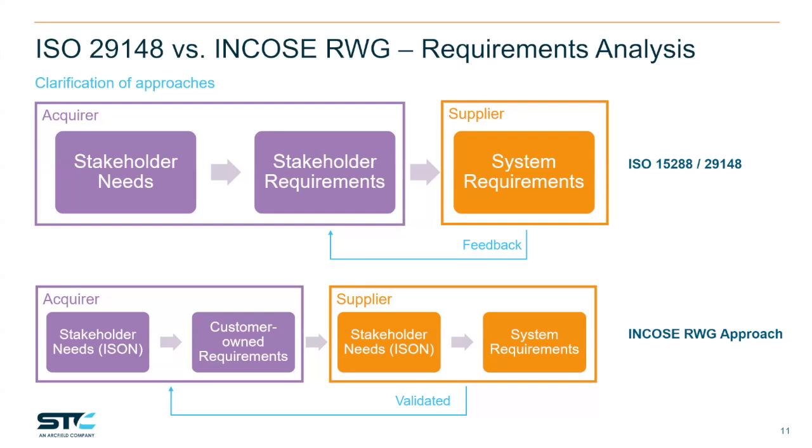The other thing is in our discussions, we talked about stakeholder requirements. Stakeholders communicate their expectations as both needs and requirements, or in the form of use cases or whatever. There's a difference between elicited needs and elicited requirements, which are inputs into the lifecycle concept and needs definition activities, whereas the integrated set of needs is a set of needs developed by the project team with underlying analysis. They took into consideration all those inputs, but there's a big distinction between that customer-owned set of requirements, or the stakeholder needs and requirements from multiple stakeholders, and the integrated set of needs. It represents a totally different thing that wasn't really done well in the past. To me, that's kind of a new concept from what's been done in the past.